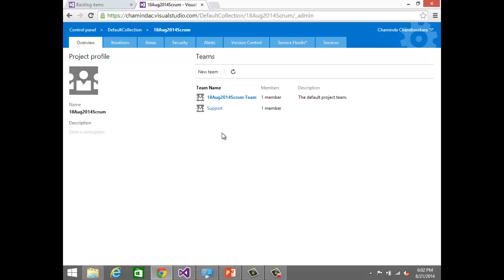So areas, is it specific to, like, this iteration or this set of iterations can be looked into one area? Or can we take different chunks and plug it into an area? It's actually two independent components in TFS, so it works independently. So one iteration and many areas, and many iterations can have many, so it's simply many to many.